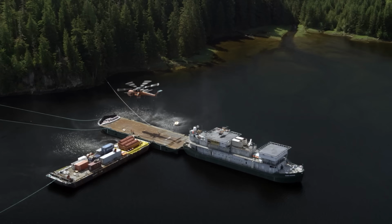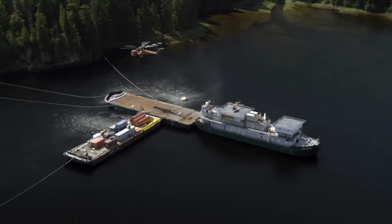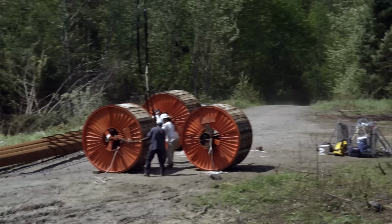Originally, we had the Sky Crane scheduled for 5 weeks, and I think we'll have all our steel set in 9 days, all our reel stands in place, all the wire to go. We actually weren't expecting to be pulling wire probably for another month. I believe probably next week we'll start our wire. In point of fact, it has taken only an astonishing 8 days.